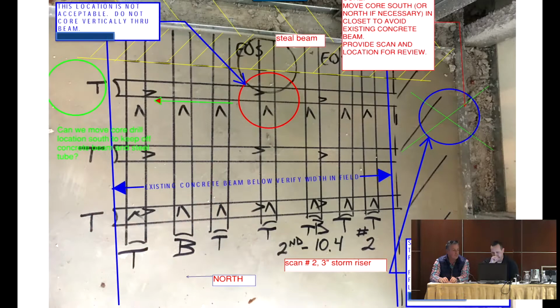And what ended up happening through this process was our models basically became invalid very quickly. So in other words, we were getting calls from the field, why is the riser through the duct? And we're looking at the model, and well, the riser is not through the duct. Well, apparently that core shifted at some point in time. Nobody knew where it shifted to or how it shifted, so the models just became useless. So this was a challenge on numerous projects.